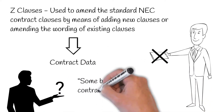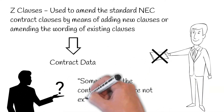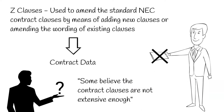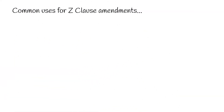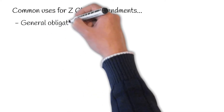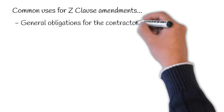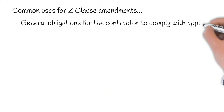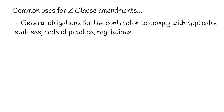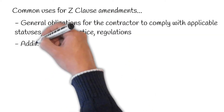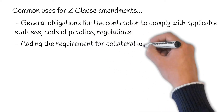Some believe the NEC provisions are not as extensive as they need to be. The following are the common uses for Z clause amendments. 1. General obligations of the contractor to comply with the applicable statutes, codes of practice, regulations and so on. 2. Add in the requirement for collateral warranties.